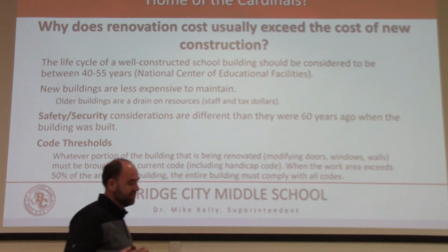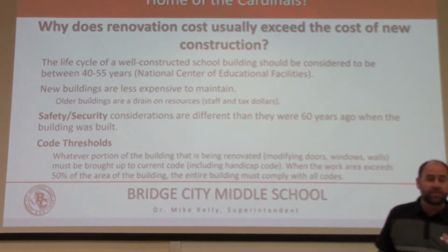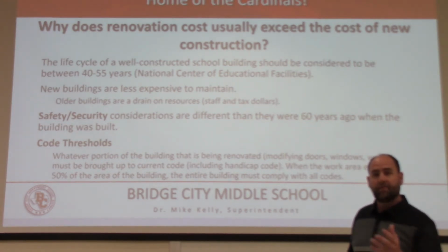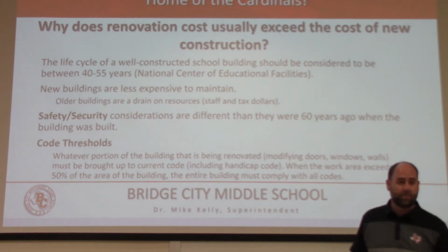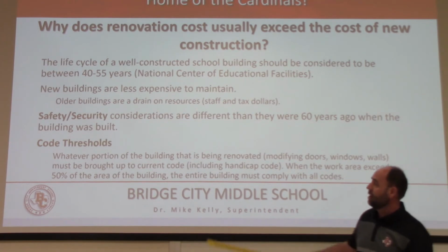So why does the cost of renovation, when on our sheet we say that the renovation cost is about 80% of a new building, and I'm going to tell you here in a minute it's actually closer to 87%, and I'm going to show you why. But it really is all about code thresholds.